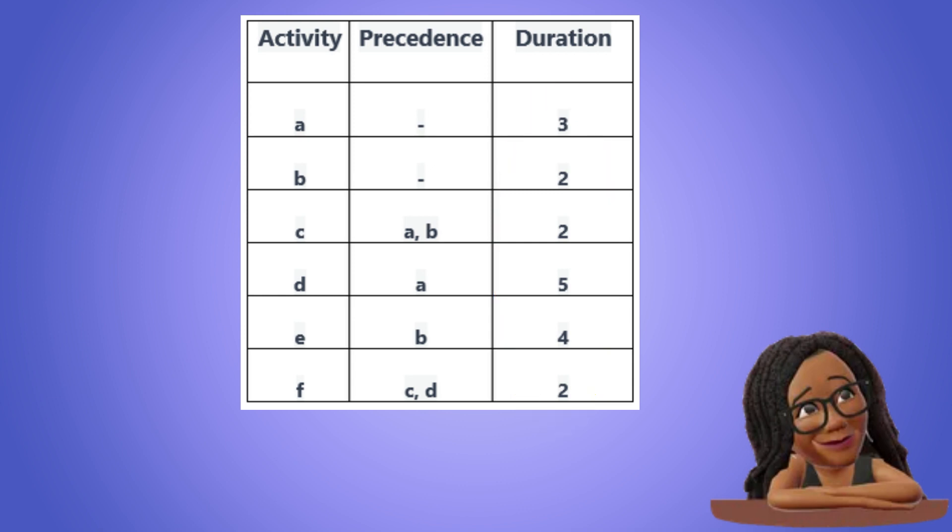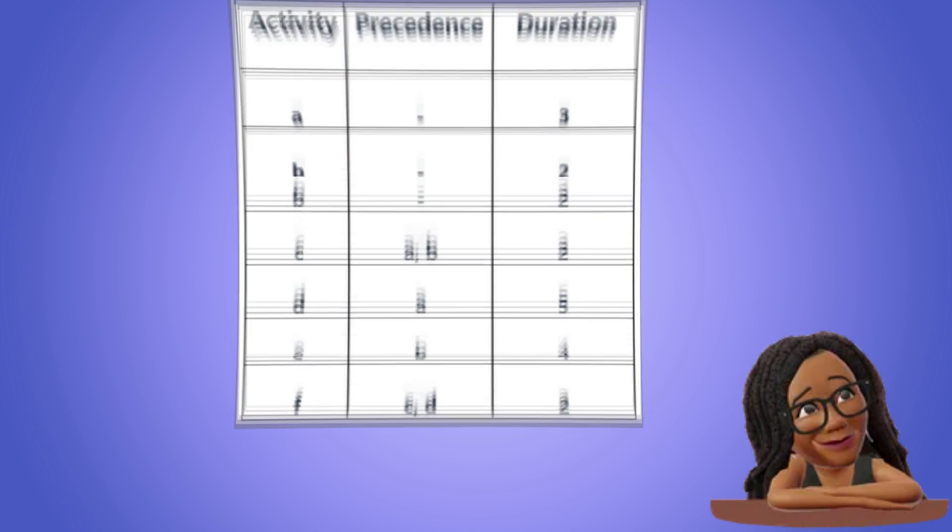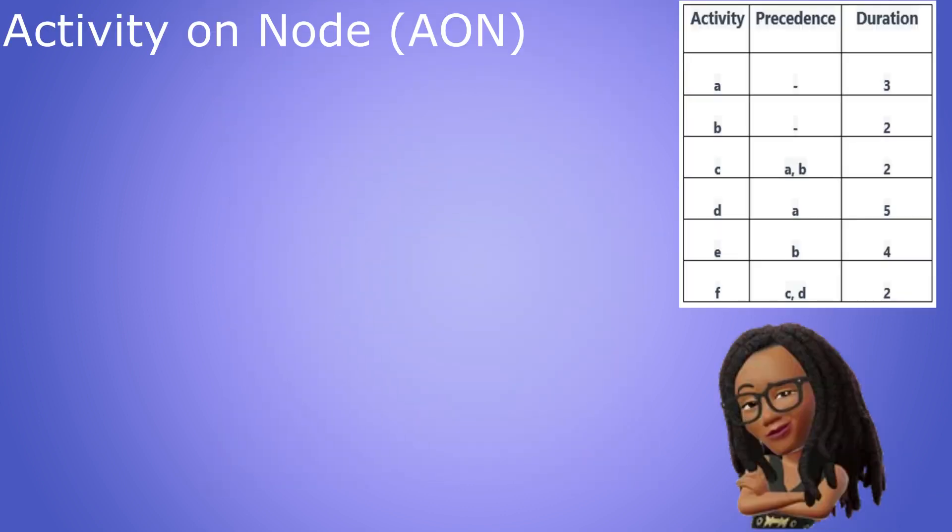Let's draw an activity on node diagram to represent this project. As we can see both A and B do not have any precedence activities. So that tells us they are the starting activities of the project.